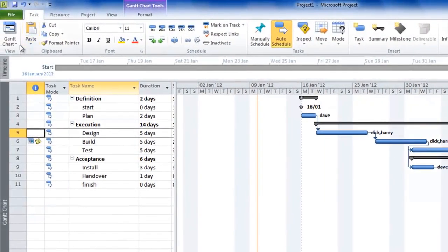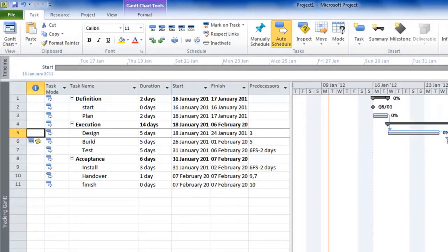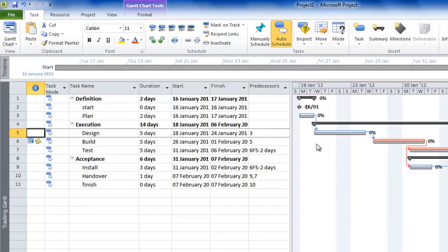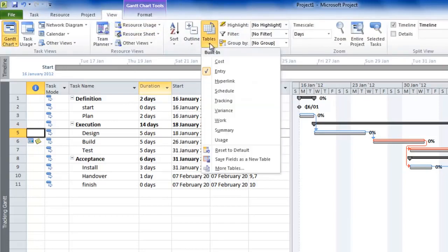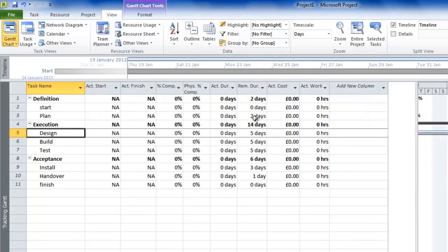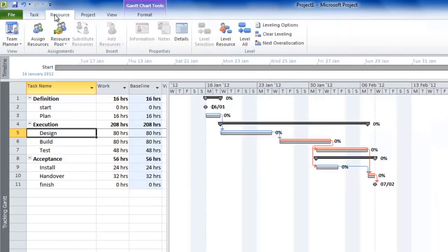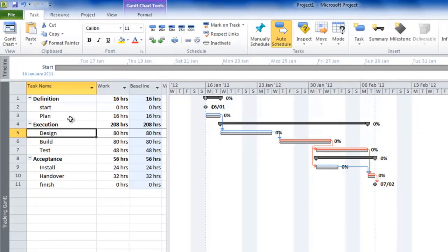Now go to the Task tab and select the Tracking Gantt view. This is similar to the normal Gantt except it has two bars for each task — the lower gray bar is the baseline, showing what was originally agreed. There are also other tables you can use, such as the Tracking table, which shows actual duration, remaining duration, actual cost, actual work, and so on. You can also use the Work table as an entry screen for monitoring and tracking progress.